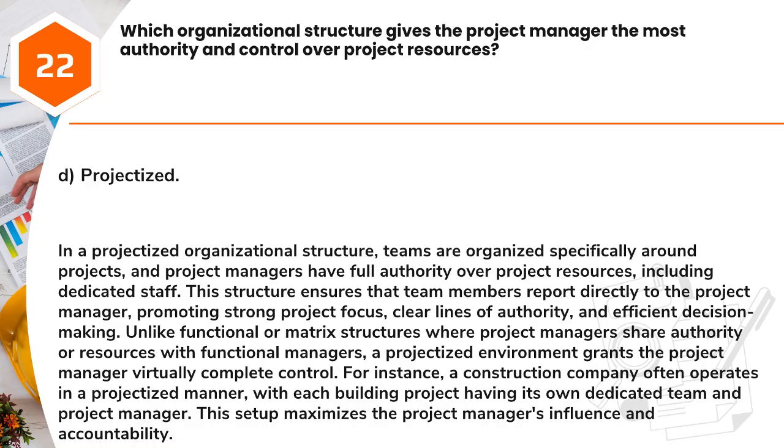Unlike functional or matrix structures where project managers share authority or resources with functional managers, a projectized environment grants the project manager virtually complete control. For instance, a construction company often operates in a projectized manner, with each building project having its own dedicated team and project manager. This setup maximizes the project manager's influence and accountability.